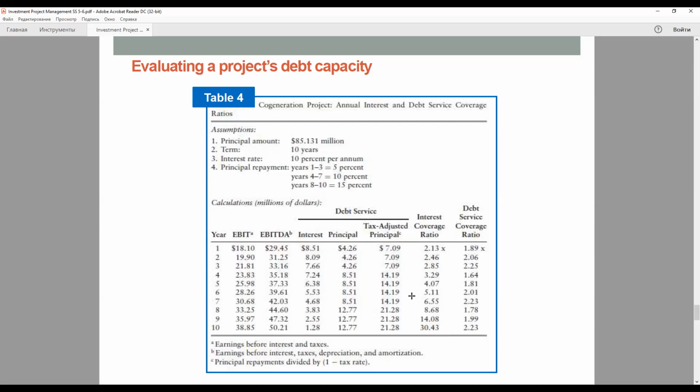First, the construction loan can be arranged so that the portion that is not repaid with the proceeds from the equity financing turns into a term loan. The term loan can be refunded if interest rates decrease, but interest rates might not decrease for several years. Hence, this strategy really does not reduce the project's interest rate exposure.